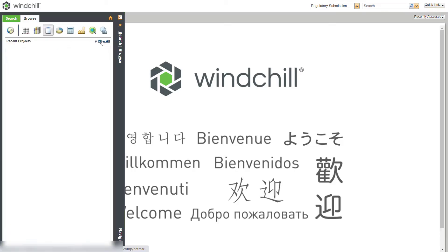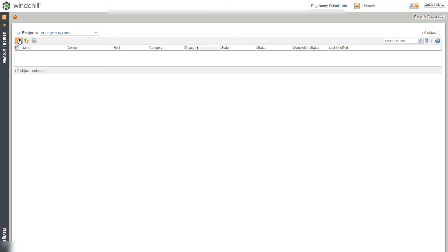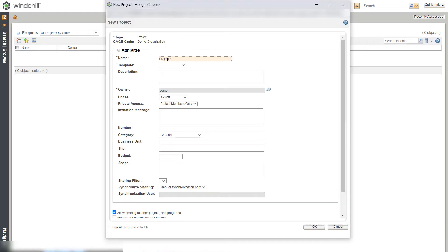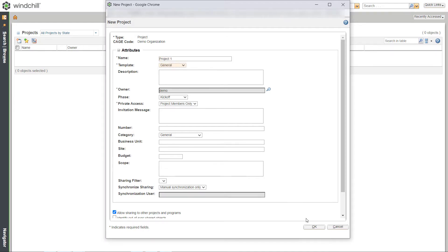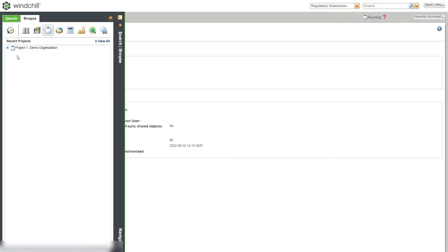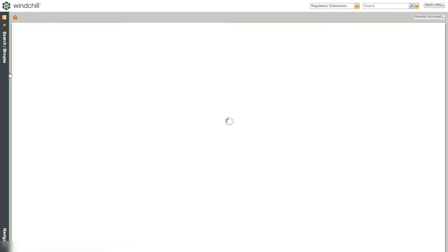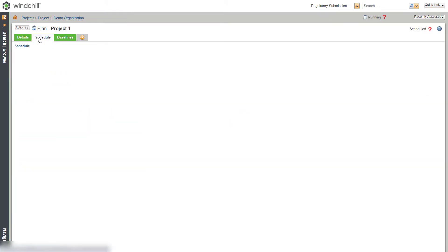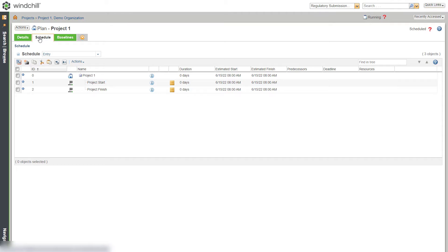Let's begin creating a project. We will name the project as Project 1. Select the template reference as General and click OK to create a project. When we create a project, one of the plans is created by default. You can observe that the Project 1 plan is created with the Milestones, Project Start and Project Finish.